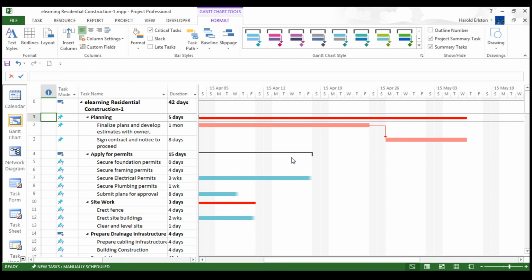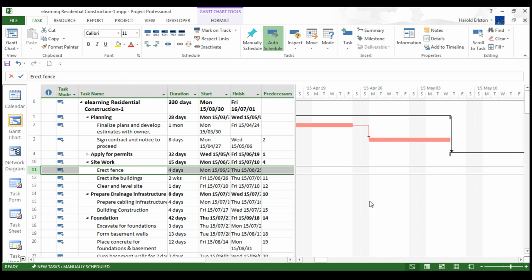If I added an additional 8 hours to bring my total to 40 hours, this would then allow the painter 5 days to do the painting job, giving him 1 extra day. So here we've kept the resource unit the same, in other words 1 unit, and added additional time to make it longer.